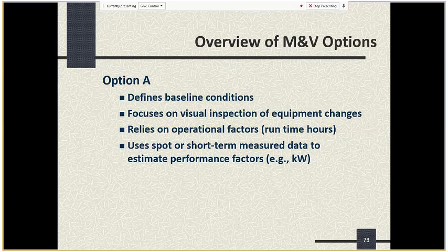Let me give you an example from another project I worked on. I did a big university project in southern Illinois, many years ago, and we went back and did pre and post measurements on the lighting, and then when we went back and did an annual visual walkthrough and inspected a big sample of the lighting, we found on the order of between 5 and 10% of the fixtures had some kind of issue, some kind of error, or something had changed.